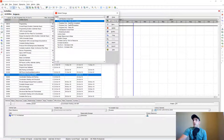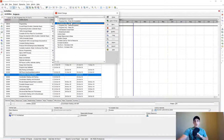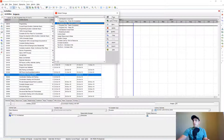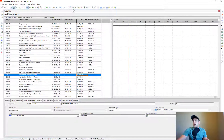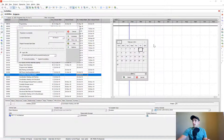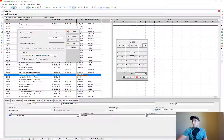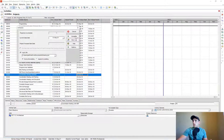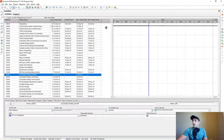Now I've accounted for almost all progress from my update and applied it into my baseline schedule. I still need to do two steps. First, let's reschedule this file for the new data date, which in this case is May 31st, so I want to match that data date.